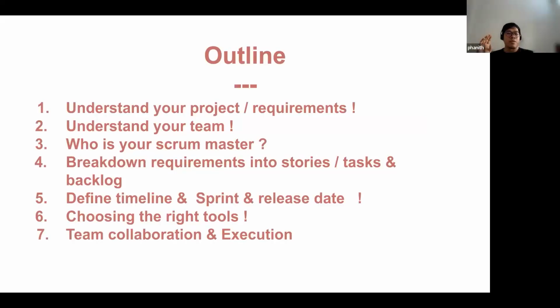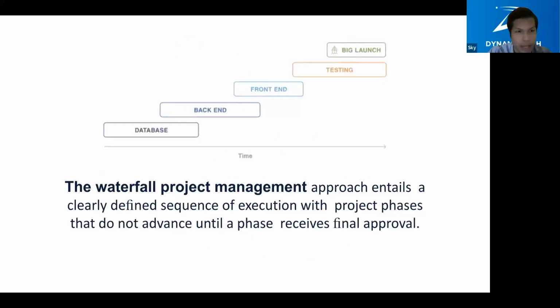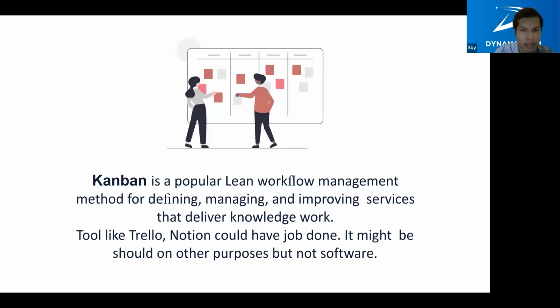I have one question. What is the problem with the waterfall methodology? Oh, okay. The waterfall is a great methodology also, but on the production side it takes more time to deliver the outcome to production, and inside the team we need to stay in the queue to do the task. For example, in waterfall, the person in charge of the database finishes the work, and only after that can the backend developer continue. So we need to go step by step to deliver the result to production. Unlike Kanban, where we can work on a specific feature and deliver it to production.